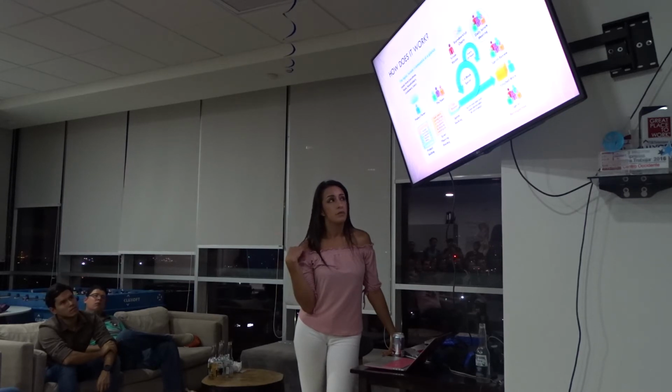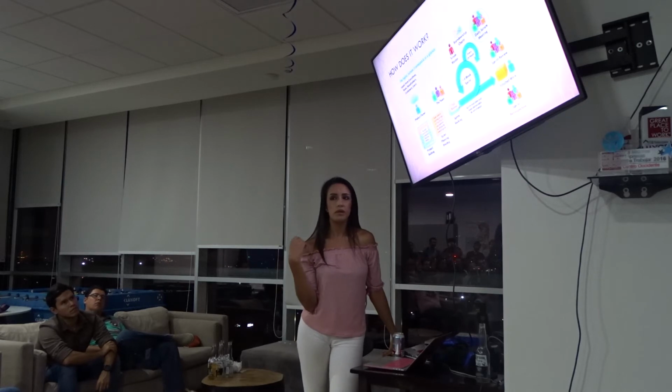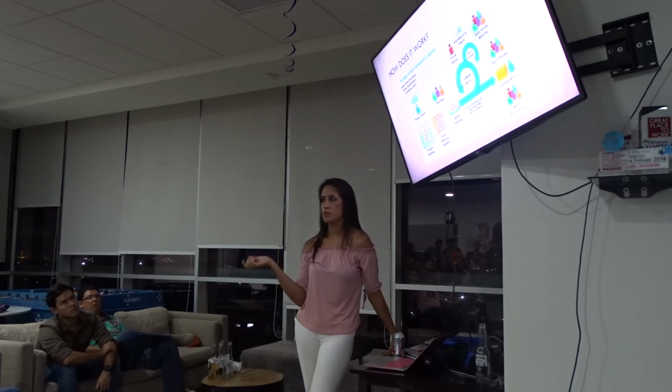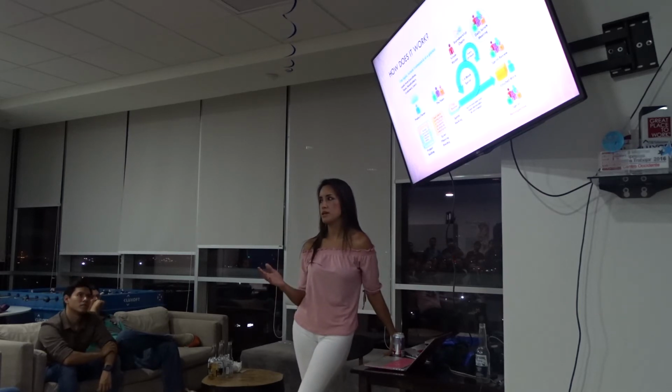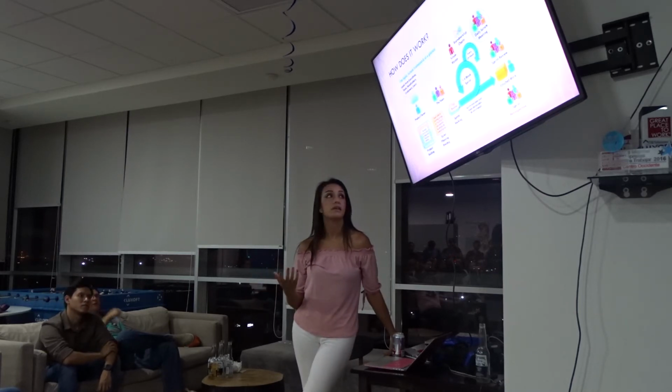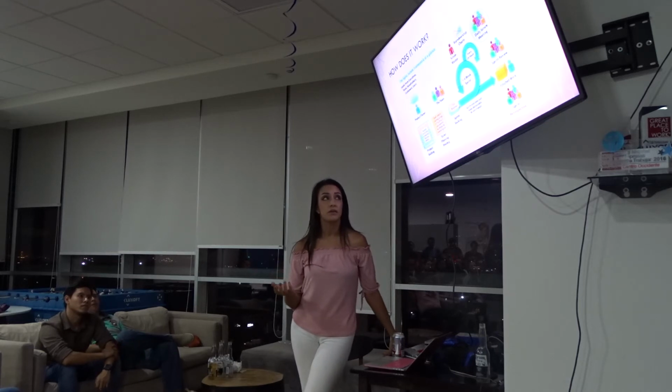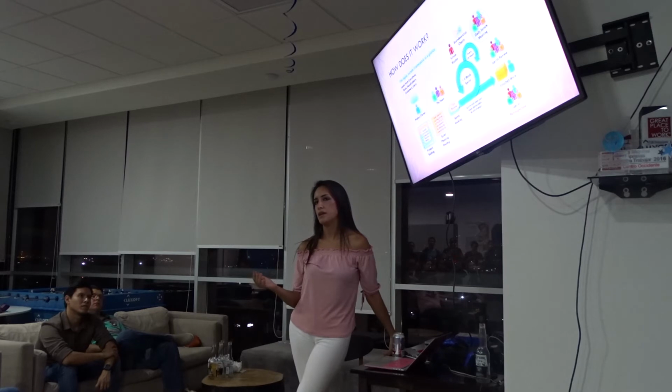Then in the team there's a sprint planning meeting, where the team selects how much work is going to be developed during the sprint. If you have time working with it, you can know if your team can finish, say, 120 story points, then you'll add tickets in this sprint planning so that you know you're going to finish those 120 story points, or maybe you only complete 100.